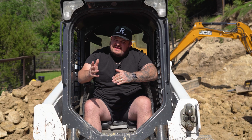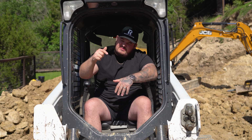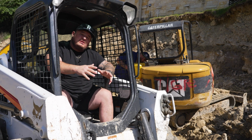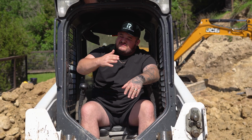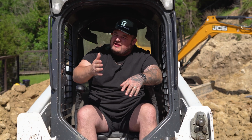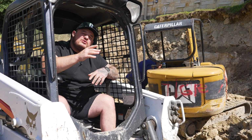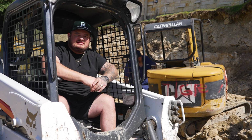What ended up happening is the new electrician that came, I ended up becoming super close with him, and he's the same electrician I use today. He got me out of a bind. It cost me about $10,000. Now, what I would do is if I get a contractor and I can tell that they're inadequate for the job, you fire them immediately on the spot. You pay them for what they've done, but you do not continue going down the wrong path. If I would have done that sooner, I would have saved myself some big bucks and wouldn't have had to learn this lesson the hard way.